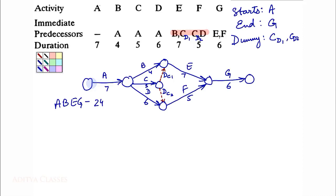Then there is a path A, C, dummy of C, E and G. When we come across a dummy, we actually do not mention it. So we will call it A, C, E, G.